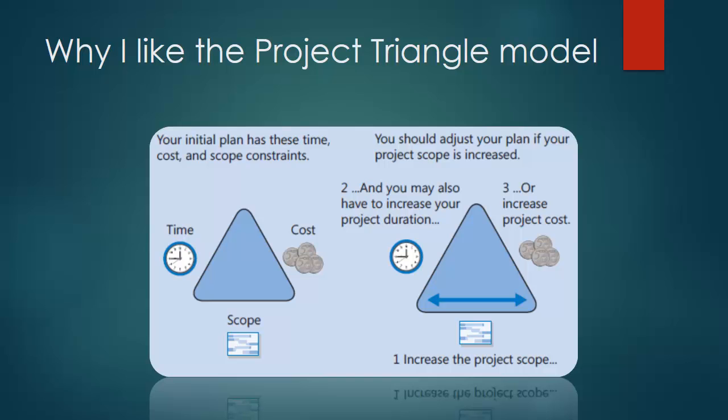And this is one reason why strategies like Agile, which sort of acknowledge up front, don't kid yourself. You can't really understand the full scope of work of a multi-month or multi-year complex project on day one. You just can't. So stop kidding yourself, Mr. PMP, and just acknowledge that, well, let's chop it up into, say, 1 month increments, and I can handle a month at a time better than I can, say, 24 or 36 months. So this is a very common problem that we deal with. And again, as you would expect, this is the most obvious case, really. There's going to be an impact on duration and cost. Okay, you with me? All right.